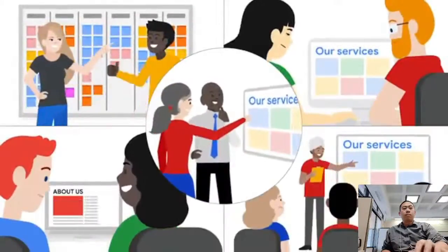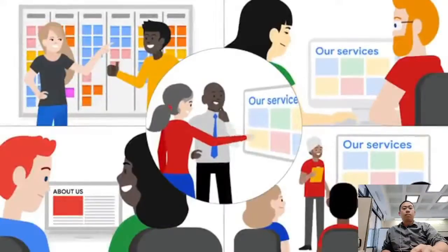An example of a project that would work well with an Agile approach might be building a website. Your team would build the different parts of the website in sprints and deliver each part to the client as they are built. This way, the website can be launched with some parts, say the main homepage, that are complete and ready for public view, while other parts, maybe the company blog or the ability to book online appointments, continue to get built out over time.